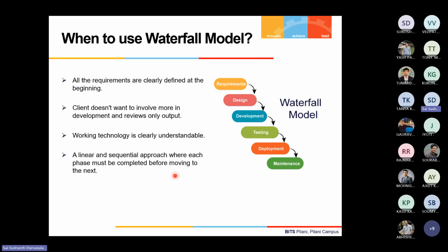Yeah, so that is correct. And usually when we talk about this waterfall model, we are talking more about the end goal or the requirements that we had started with. And bugs usually occur at various levels, right? So maybe the designer didn't correctly design for what the requirements were, right? Then it is a design bug. If the developer didn't implement what was designed correctly, then it's a software bug, right? And if the tester had a wrong scenario because of which it failed, then it's a test case bug.